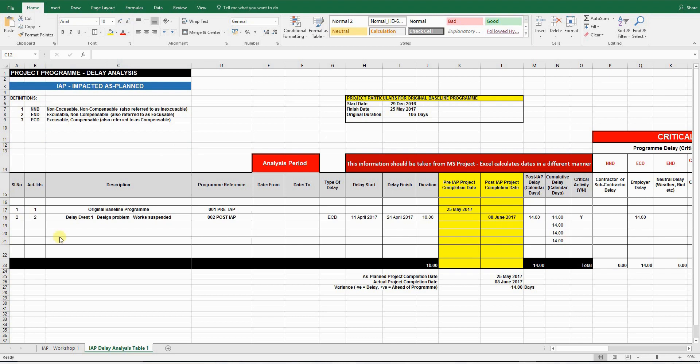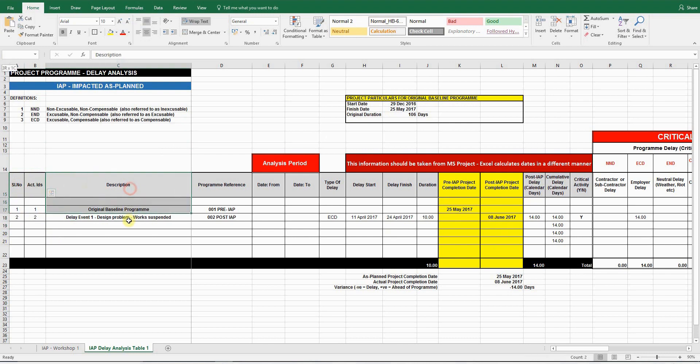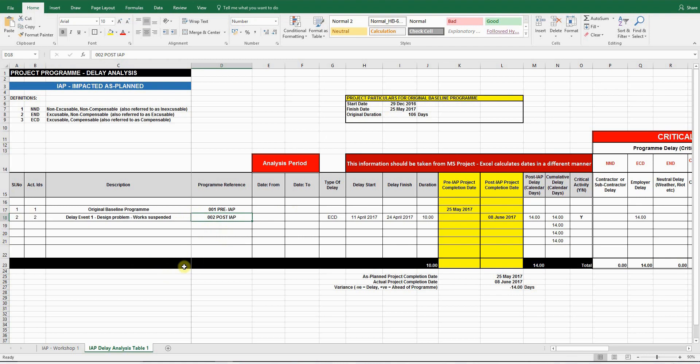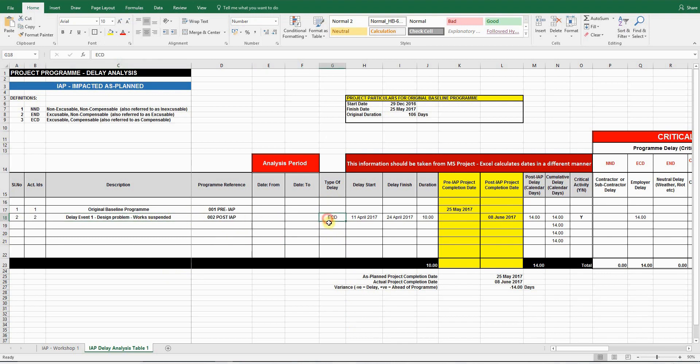Let's go through the various components of this delay analysis table. You have serial number, activity IDs, a description, which is a description of the original baseline program, and a delay event. In this particular example, it's a design problem and the works are suspended. You also need to have a program reference, which will be original baseline program reference, and your delay event program reference, which you will be saving as a separate baseline. Then you'll have the type of delay. Since the design delay is caused by the client, it's an excusable and compensable delay.